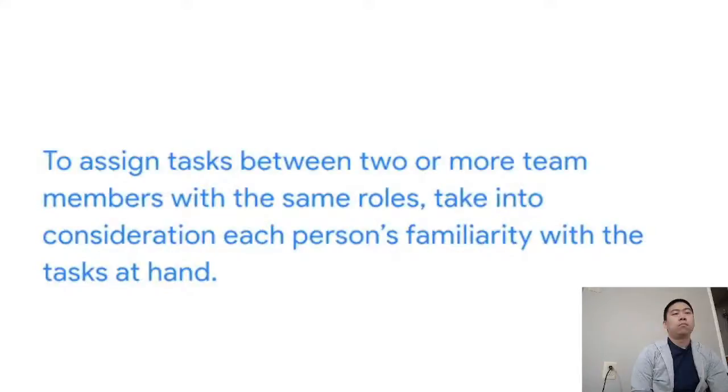And the designer is assigned to the task of implementing your feedback. A web developer will be assigned to the next task of developing the site itself. Sometimes your team will have multiple teammates working in the same type of role. To assign tasks between 2 or more team members with the same roles, you might take into consideration each person's familiarity with the tasks at hand.